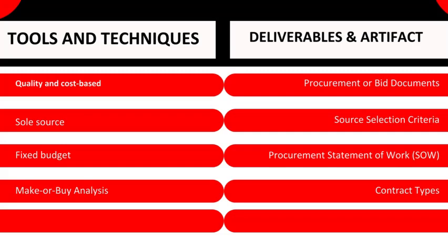Finally, the team leader identifies the metrics that will be used to manage the procurement process and ensure that the project's procurement needs are being met. For example, the team leader tracks the number of vendors that have been contacted, the number of quotes that have been received, and the status of each procurement activity. By following a procurement management process, the team leader can ensure that the team has the resources it needs to complete the project on time and within budget.